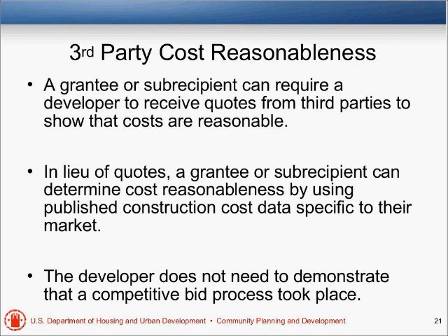We do multiple draws, and for every draw, they have to document that it's in the original project contract. They have to show me the receipt and the canceled check, which they do. In the final draw, they'll show me release of liens and inspection. So we're pretty strict on them. The developer has to pay for it before you'll send them any money.